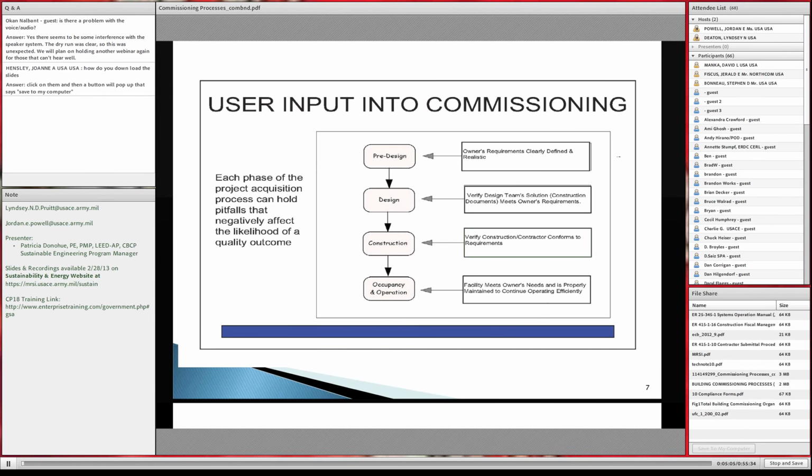And have the commissioning authority available and focused on that, and have him provide that continuity from a meeting with the owner to make sure that it's in the design, and then also occurring in construction through the commissioning plan and implementation. And then afterwards, during the occupancy, making sure, again, that the owner's requirements are there. I'm not saying that the owner gets everything that they request, because it may not have been in the scope or the cost funding, but it has to be what was within scope, within the contract documents.